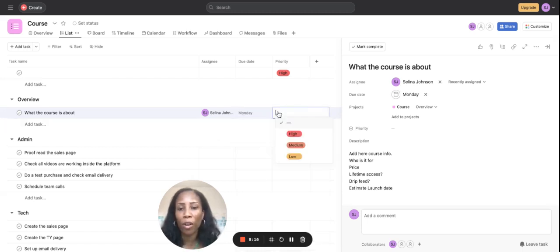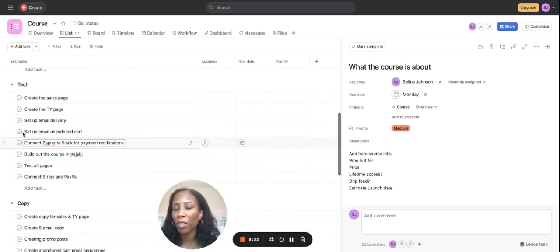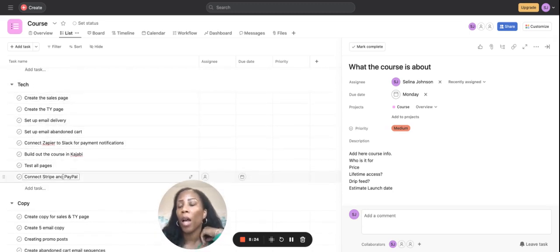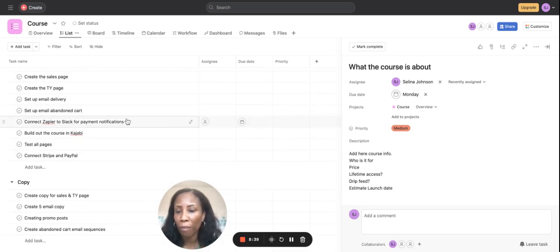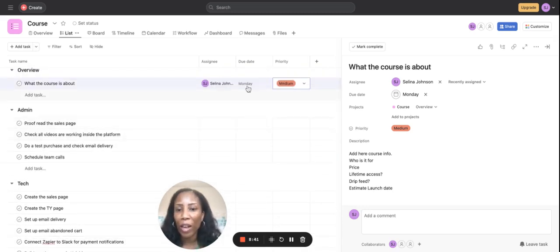And then you want to put in the priority. Is it a low, high, or medium priority? Because what could happen is if the tech person's got all these things to do, multiple things that are due on the same date, we want to make sure that they're aware of which ones are more of the higher priority, that's more urgent to get done, so that a decision is made based on the business needs. So essentially, you're going to have all these columns filled in. It's very key if you had the dates, and then this is all within the free version.